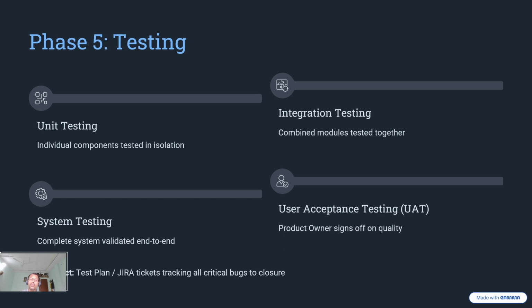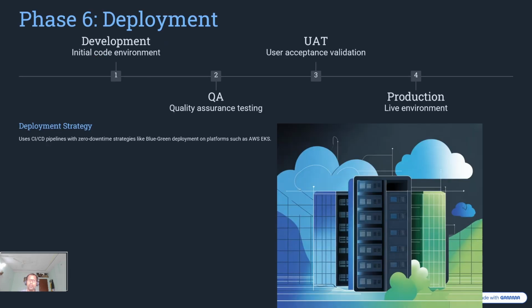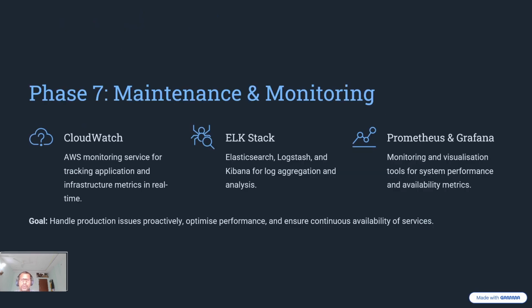The code will be moved to the user acceptance environment for client testing. Once the client provides sign off, then the code will be moved to production. That is nothing but deployment. Once deployment is completed, then that will be considered as maintenance mode.